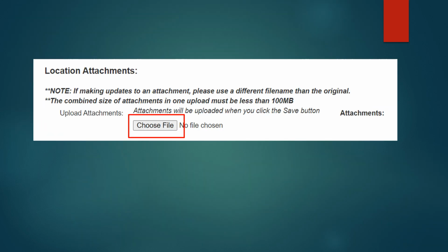Additionally, an exhibit must be attached to the parent or location page of the RES before it can be submitted. Attachments can be dragged and dropped onto the Choose File button, and multiple can be dropped or attached at once for efficiency. Remember, plans attached to the RES do not have to be approved plan sets. A KMZ file showing location, project limits, tree clearing limits, etc. is most helpful to determine impacts.